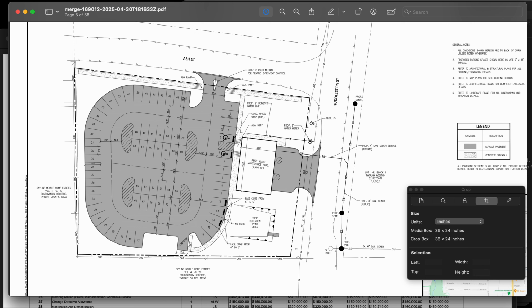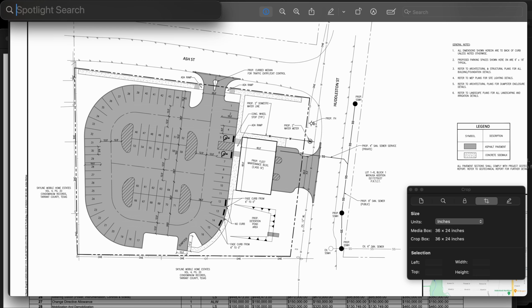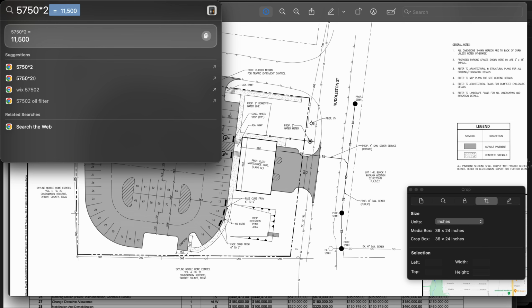To keep it short and sweet, just because it's all grass, it shouldn't really be more than $2 a square yard for this. This is just my price with my experience. For an acre, it will take you maybe a day maximum to strip that grass. So what did we say, 5,750 multiplied by 2?